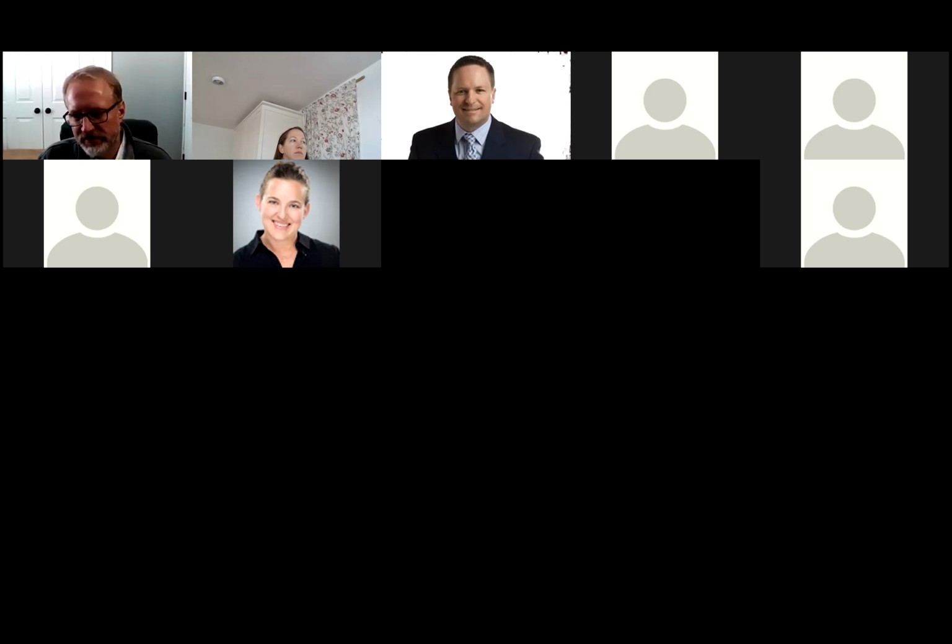Sarah, if I could just jump in there. I think the other thing that we had talked about was that it does make sense for the design team to own it through the design process. And then the documentation gets switched over to the commissioning authority through the construction process. We have the OPR and the BOD that follows it; both of those documents are owned by the design team through the design process and then are provided to the commissioning authority through construction.